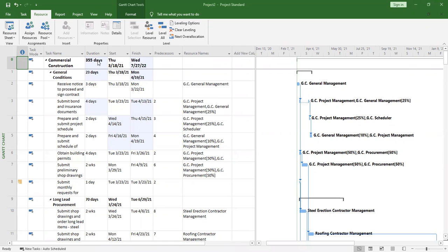So here you can see that if I don't overexhaust my resources, I'm going to take 11 more days. Then you analyze and see: if I take 11 more days, will it cost more? Am I going to enter into the liquidated damages period? If you're not entering into the liquidated damages period, you may decide to work on just optimum utilization of resources. But if resource leveling is going to make you finish after 2 months, that means you're going to be paying liquidated damages. So you may decide to overexhaust your resources just to finish in time. The decision will always be on your side.